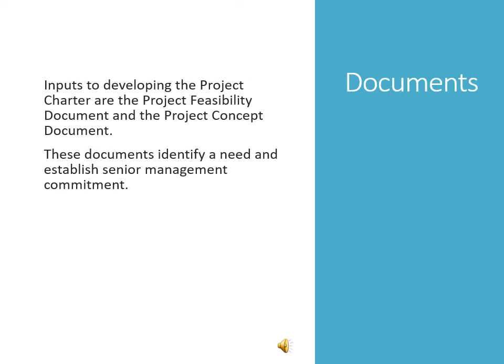Documents that we consider as very important. Inputs to developing the project charter are the project feasibility document and the project concept document. These documents identify a need and establish senior management commitment in any organization. If you don't have commitment from senior management, your directors or board, it will be quite difficult for you to even start or initiate the project.